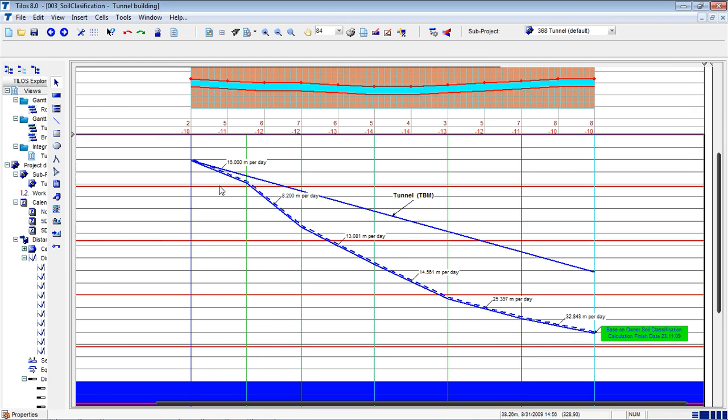If I am in the early design phase and haven't designed our TBM yet, I still have some chance to get a better TBM. Or I can change the number of TBMs if I am really not able to finish my project. Ordering another TBM, the people in metro and tunnel projects will understand what I mean, will cost another millions.